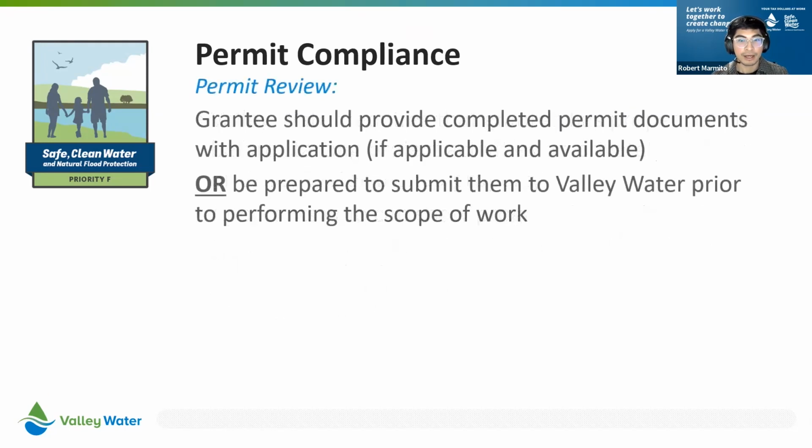Again, you should provide completed permit documents with your application if applicable, or be prepared to submit them to Valley Water prior to performing the scope of work.